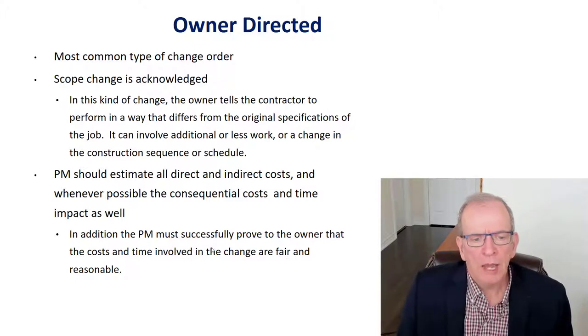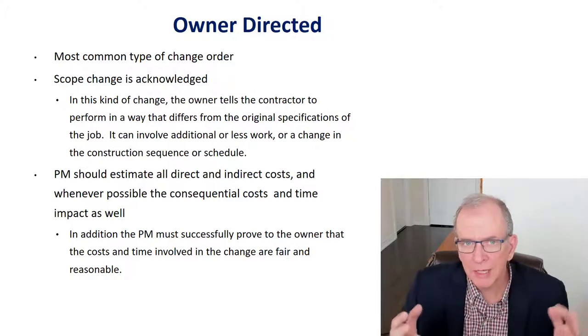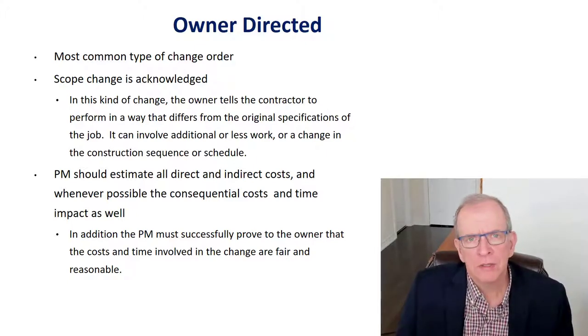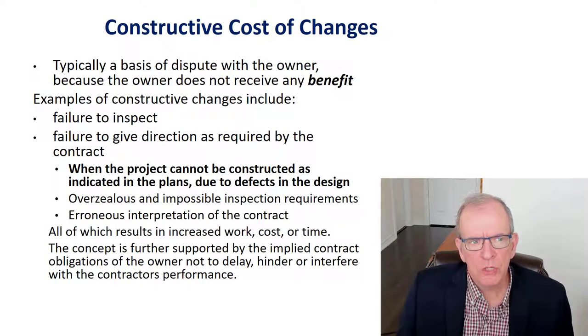So you really have to take an approach that if we have really good documentation in place, really accurate data as far as material costs, as far as labor costs, as far as our original plan, as far as how the schedule is impacted as a result of this, and you're able to track that and demonstrate that, you have a pretty good chance then of being able to recoup those costs and to go after a certain fair margin for your profit.